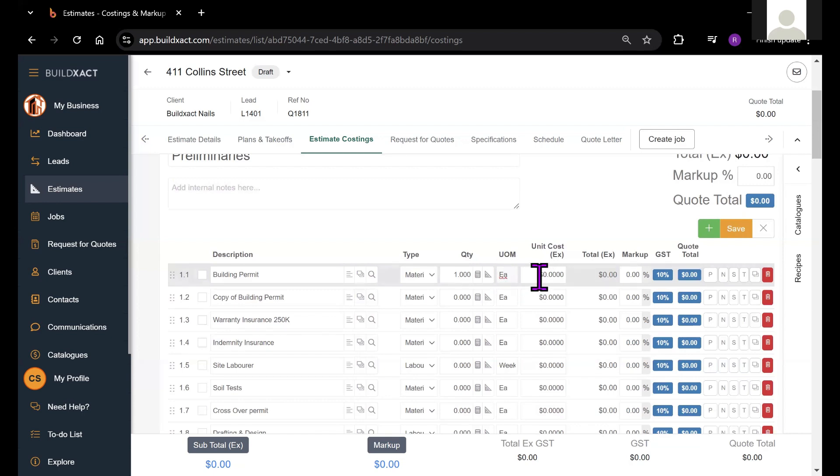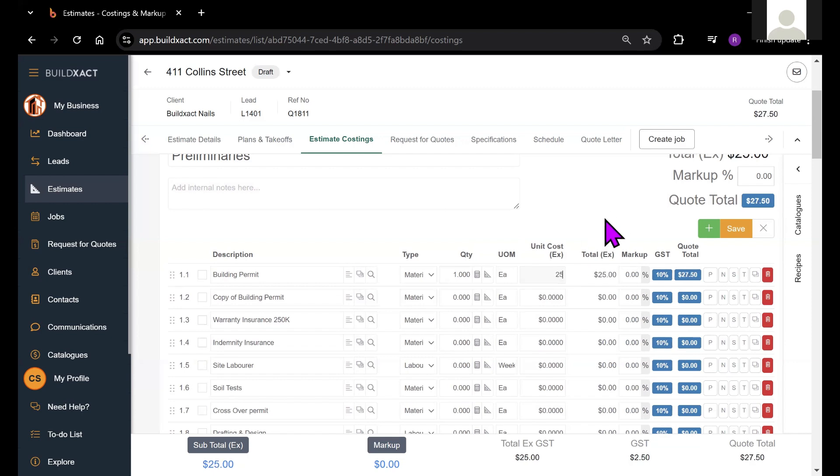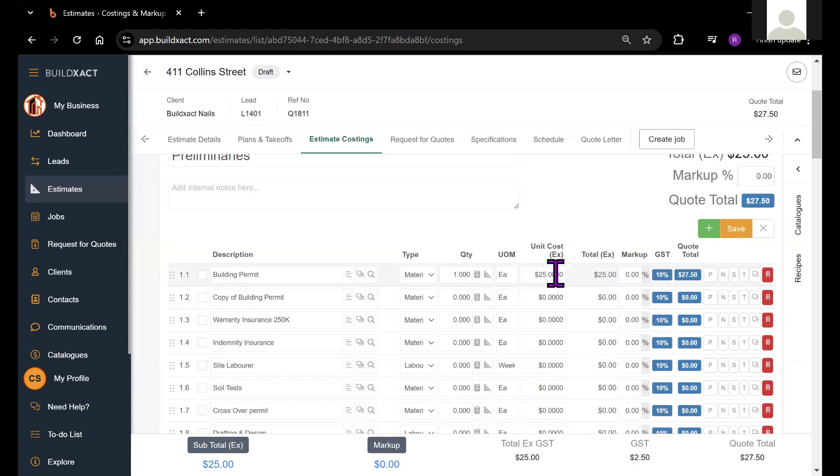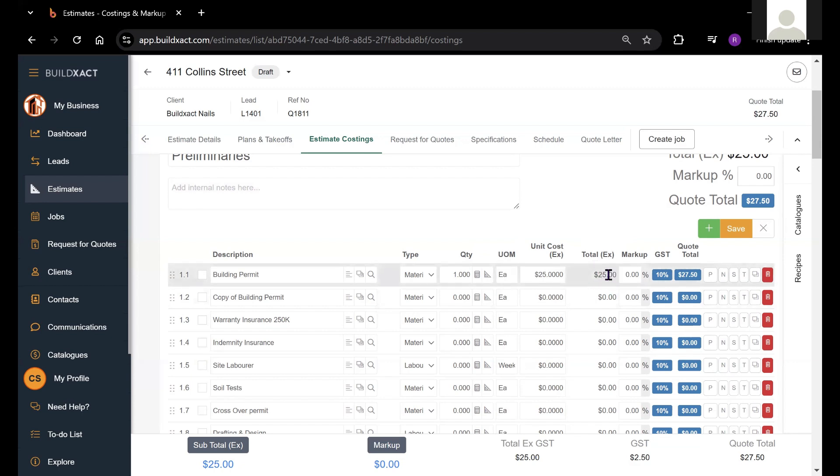Each item will have a unit of measurement or how the item is measured or purchased. And we also have the unit cost fields, which basically tells you the cost of each of these items. The quantity and the unit cost will multiply together to get our total price excluding tax and excluding markup.